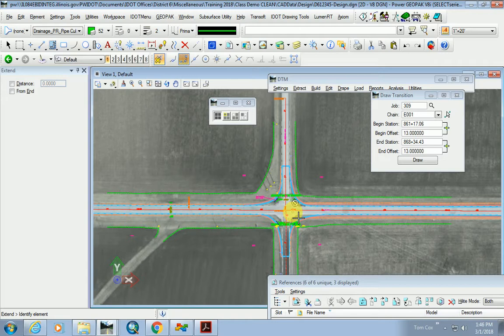How do you find the right of way? Oh, good one. Yeah, very important. To find the right of way, you contact Andy Wetzel in Land Acquisition, which they already did on this project, and you tell them what you're doing. When it comes to right of way, you're going to get it one of two ways. You're going to get it from Andy getting it close. If there's a good chance you're not going to need right of way, this is when you first get started, it's not worth doing a land survey that soon. And so instead, you contact Andy.